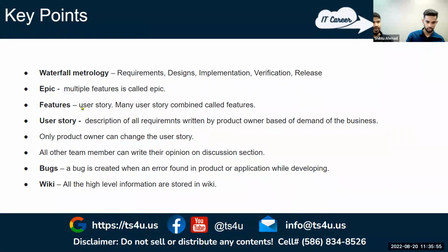It is not humanly possible to build a house in a day, right? So you have to break down into small things, and Scrum teaches us to make things small and deliver every day. So in Scrum, the requirements we call user stories. The criteria is that it has to be small, so the team can understand it and get the work done. It can be one day of work, two days, or three days. If it takes more than that, they will start asking themselves, we need to break down this user story.